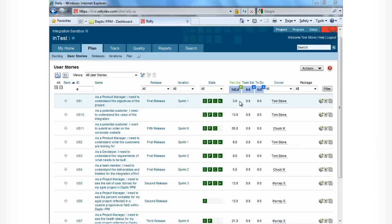Let's go into Rally and figure out why this project is in trouble. We can see there are 142 story points for this project, and from Adaptive, we saw about 37% of those have been accepted. Now, based on the scheduled delivery date and the velocity of work we're expecting from this project, we're behind schedule.